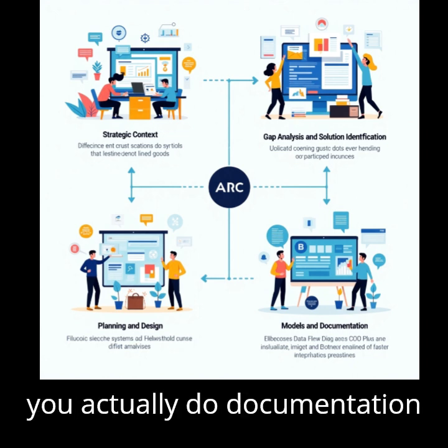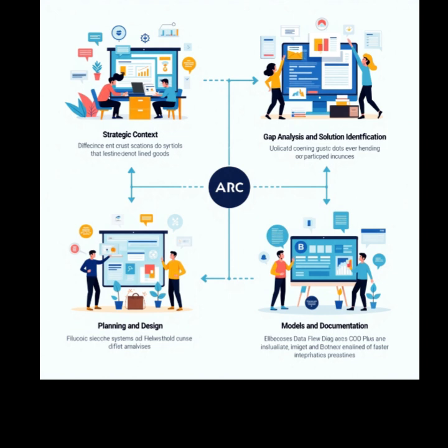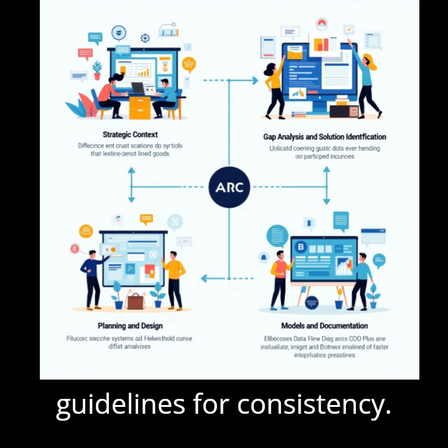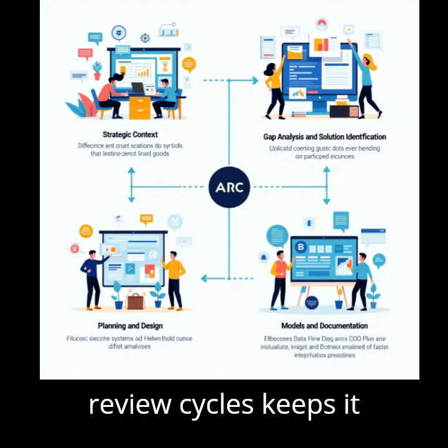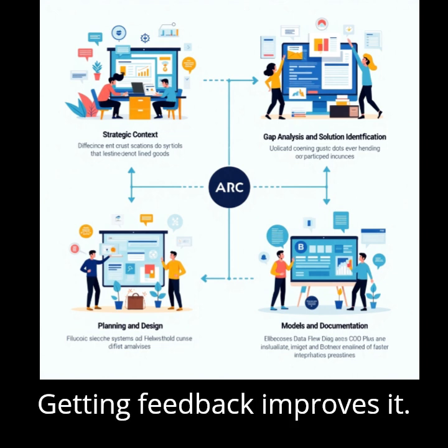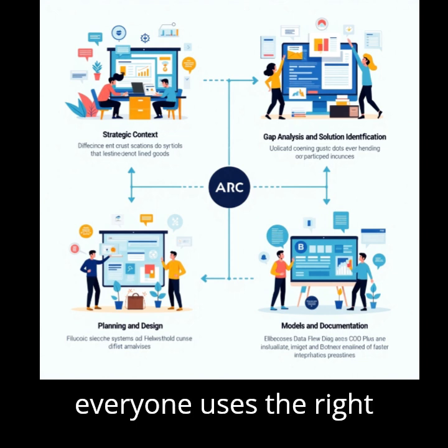How do you actually do documentation well? It requires planning, clear standards and guidelines for consistency. Using collaboration tools like wikis helps. Having review cycles keeps it accurate and up to date. Getting feedback improves it. And document control ensures everyone uses the right version.